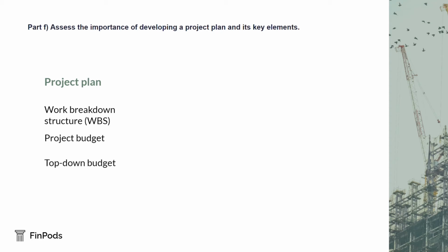Top-down budgeting describes the situation where the budget is imposed from above. Project managers are allocated a budget for the project based on an estimate made by senior management. In bottom-up budgeting, the project manager consults the project team and others to calculate a budget based on the tasks that make up the project. WBS is a useful tool in this process.